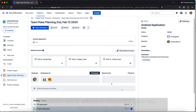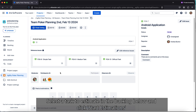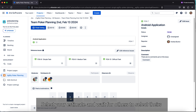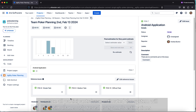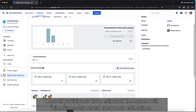Select a task to estimate in the backlog below and click Start Estimations. Select your estimate and wait for others to select theirs — this is indicated by a tick. Once all participants have estimated, the system will simultaneously reveal everyone's estimations.